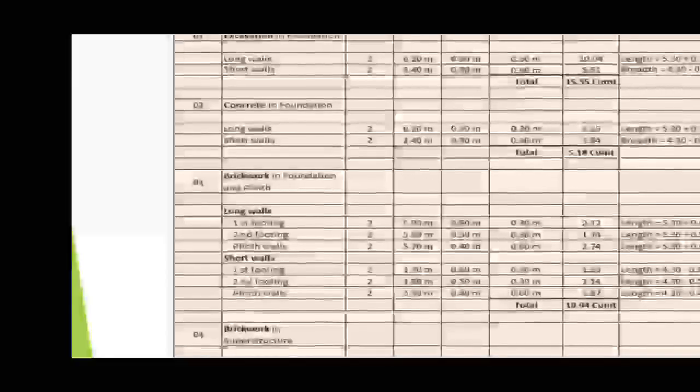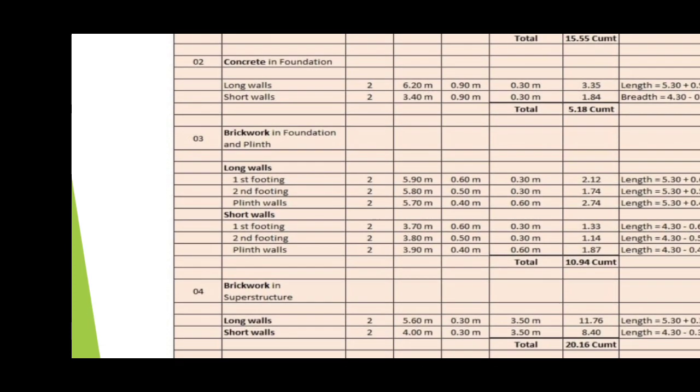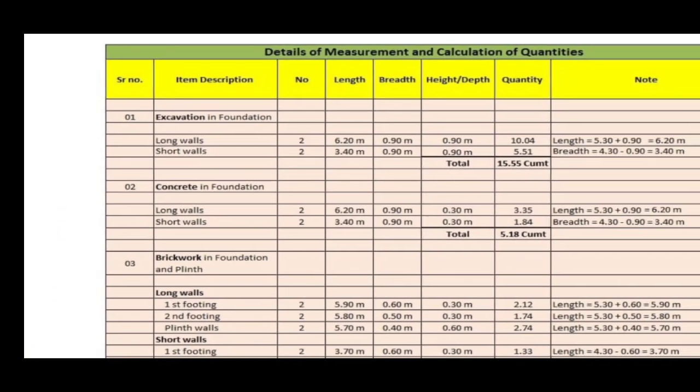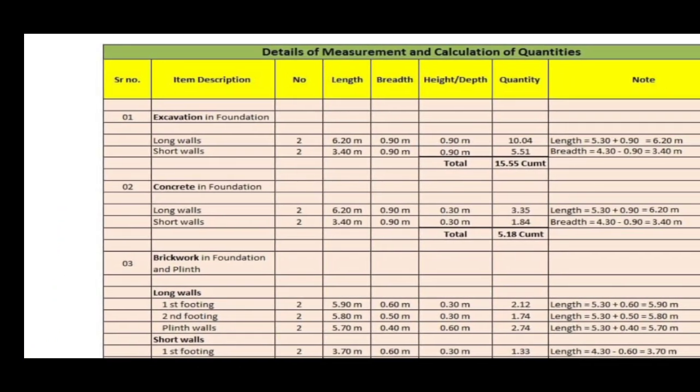From the figure we can get the depth of excavation. Now, by multiplying these three dimensions, we get the quantity of excavation for long wall and short wall separately.